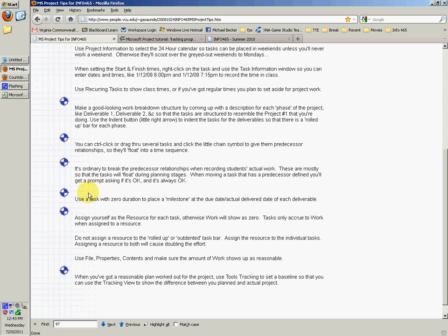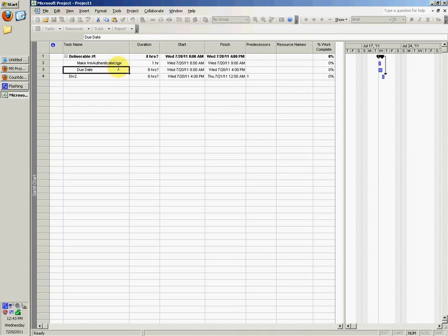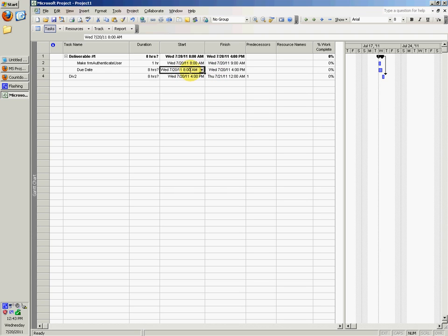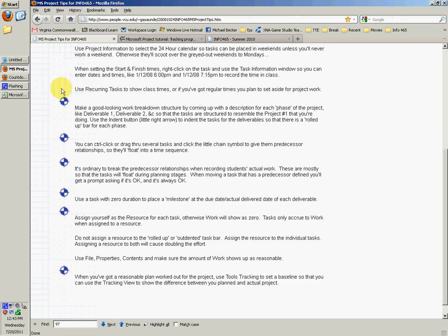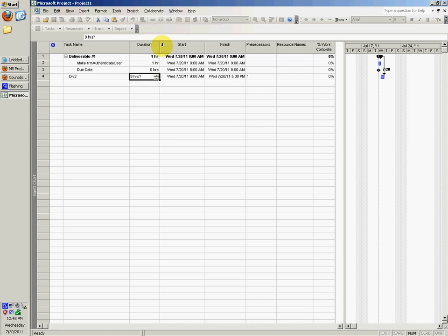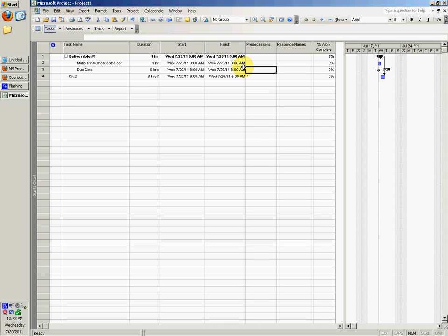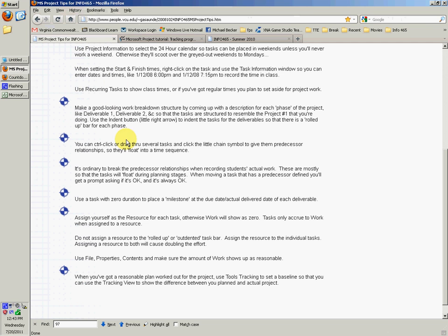You can use a task with zero duration to place a milestone at the due date and actual delivered date of each deliverable. So right here you'd say due date, and you would want to make it 6 o'clock on whatever due date deliverable one was due. He wants you to put zero as that duration, but you'd want it to be requiring you to have everything else complete for div one before you can actually turn it in.